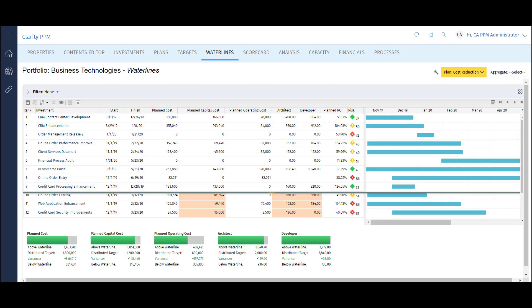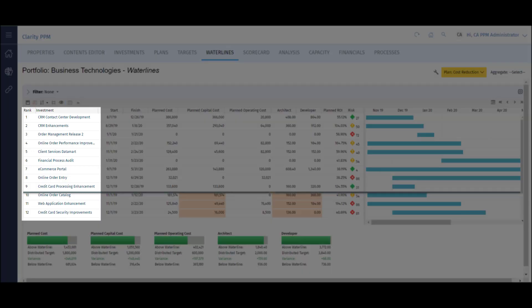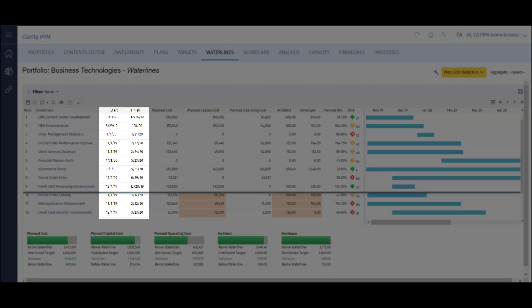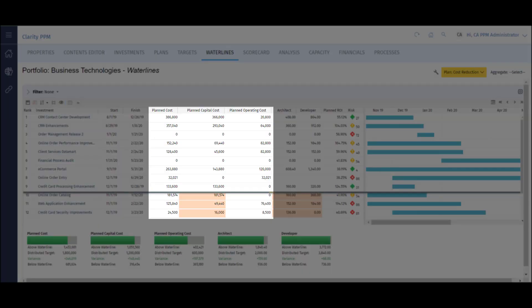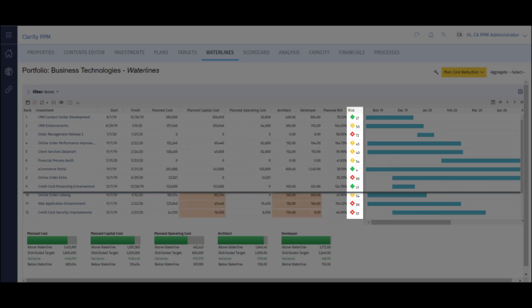So what is a portfolio in Clarity terms? A portfolio is basically a logical grouping of work items or projects we can use to plan and schedule work over a specified period of time. On my screen, I have a list of ranked projects with key information like start and finish date, planned costs broken out by capital and operating, role demand, and risk score.